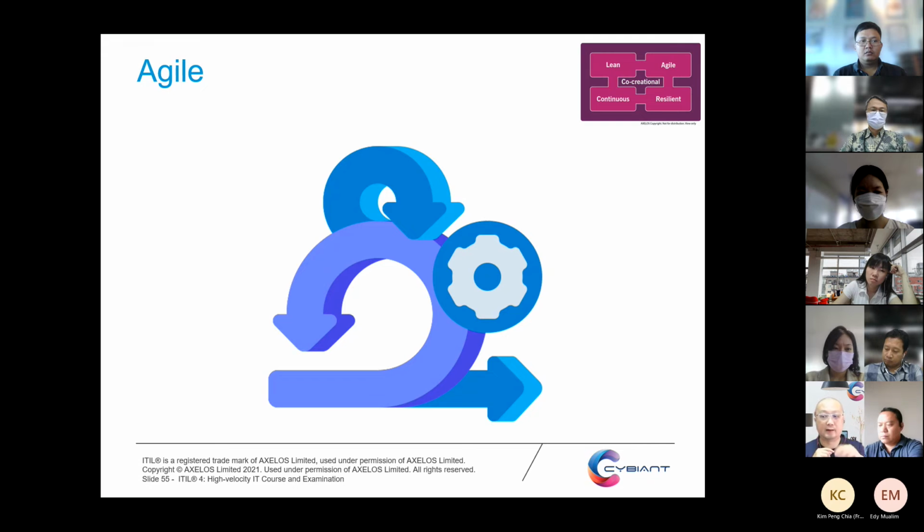So let's say they commit, okay, John, for this sprint, the next 2 weeks, which is 10 business days, we are doing 3 items. The developers will tell the product owner, we are committed. After the 10 days, we will code the lines of the program. We will develop it. We will test it. Then we will release it into production.